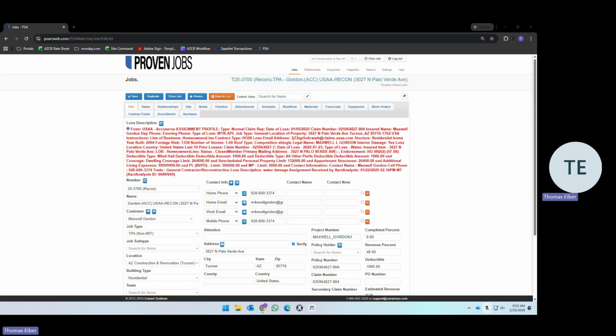PSA deliverable, you need to deliver to PSA the final photos and a COS, project sign off, uploaded from the PM. So those are the deliverables to the next role. There is no next role really that receives those, but for auditing purposes, we need to make sure we have those uploaded so we can get paid.